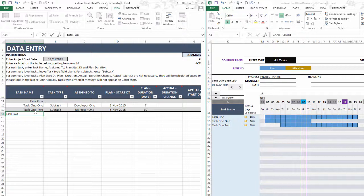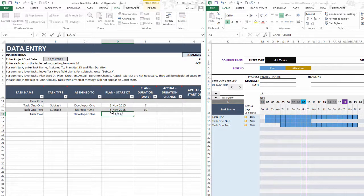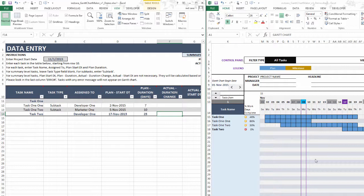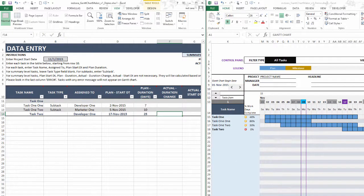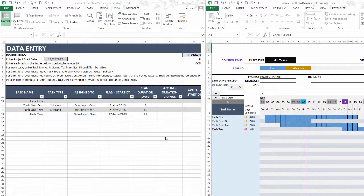Now let's use an example without subtasks — a single summary task. This is Task 2. I'll assign it to Developer 1, set the start date to November 17th, and give it a duration of 25 days. The Gantt chart automatically updates. When there's no subtask, the template still understands that and plots it out. This is how the template implements the work breakdown structure framework.